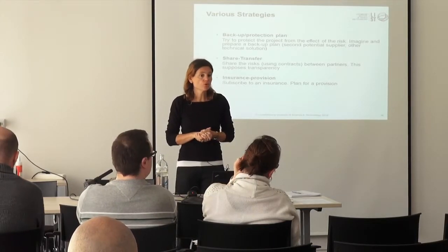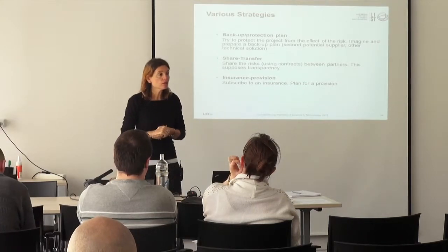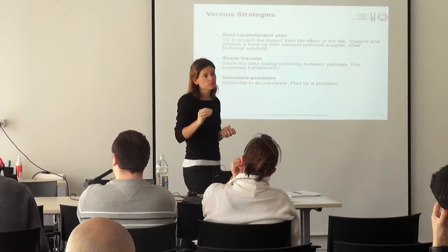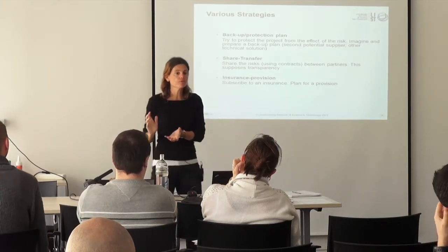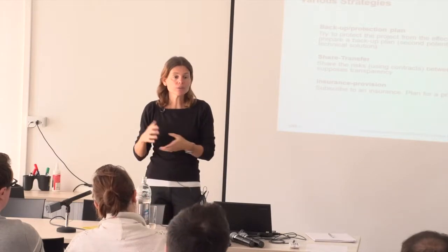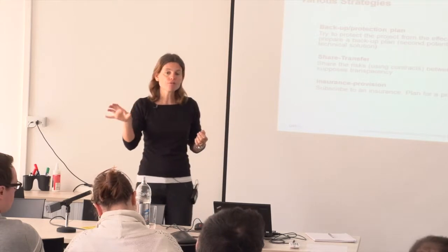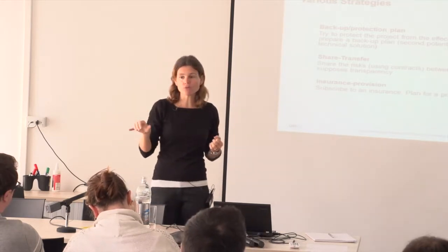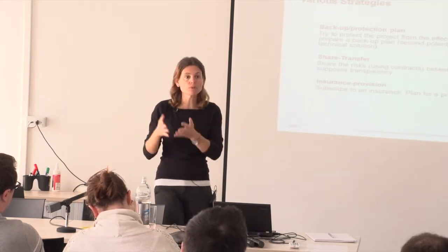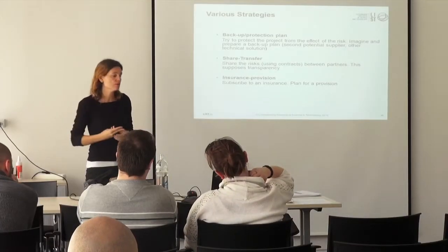That's a good way of handling risks. It might not be that for each specific risk you are going to have that small amount of money or time ready if something bad happens. It's just overall on your project you have some buffers on the budget and buffers on the timing, so that at some point you can use that buffer for whatever risk is happening.